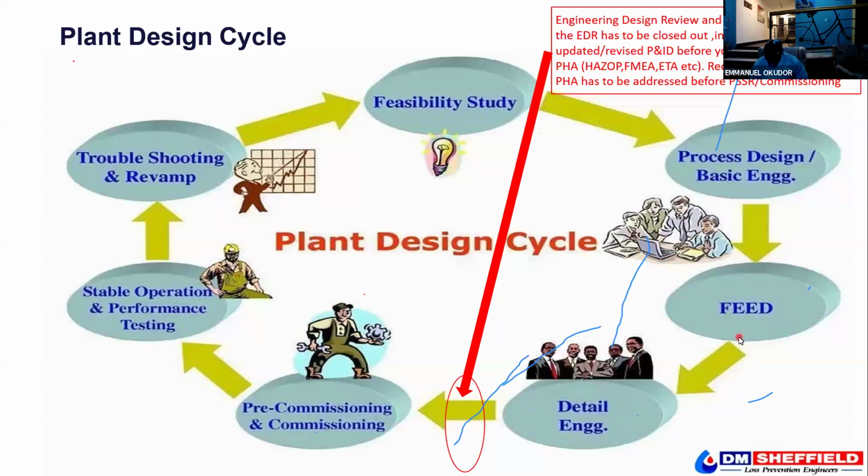Hello. So here, just to start to wrap up. You do your process engineering design review, but the final one before you do your hazard review, because from your hazard review you use your approved P&ID, approved for construction or approved for hazard.